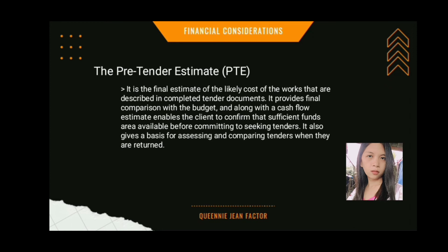If the pre-tender estimate exceeds the approved budget, an explanation should be provided for the client to consider and issue instructions. As with the tender documents, the pre-tender estimate should be broken down into a series of packages. This will allow easy appraisals of tenders received, which are likely to be prepared by contractors based on prices of packages received from subcontractors.